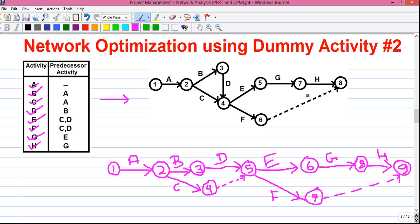So the best practice is while considering an activity, just look next two or three activities and consider whether the activity you are going to draw is the predecessor activity for any upcoming activity. For example, while drawing activity D, look two activities forward and see that activity D is the predecessor activity for activity E. So when you see something like this, try to merge that particular activity with the paired activity. If you can merge them together, you will save an event and a dummy activity. This is the best practice while drawing the network diagram.